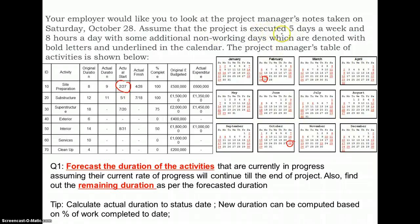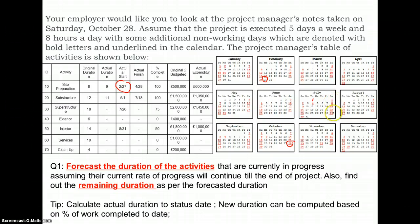We are assuming that we are working with the standard five days a week and eight hours a day shift, with a few additional non-working days. Those additional non-working days are indicated by the underlined areas here. All the red dates with underlining are the non-working days, such as Sundays and a few non-working holidays. The project manager's table of activities is indicated here.